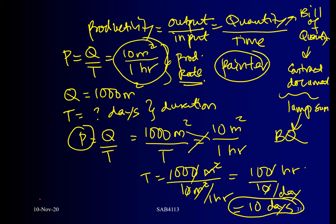So the painting work as an activity — we can input 10 days into Microsoft Project. How do you get 10 days? Based on calculation, not assumption. There must be a basis. That's why during construction, in order to monitor and control activities, after the planning process you implement the work. During implementation, the next process is monitoring and control, one of which is monitoring the productivity of your workforce or equipment.